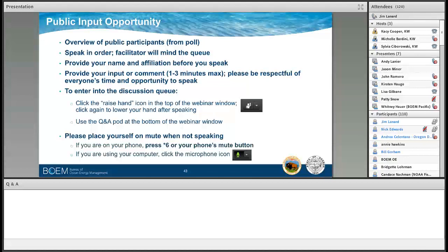The best example I can give you where this has maybe caused a problem is in California, where there is serious consideration for a call area to be expanded, which will require then that a completely new process begin for that call area and the expanded area, and will delay getting us forward to auctions.